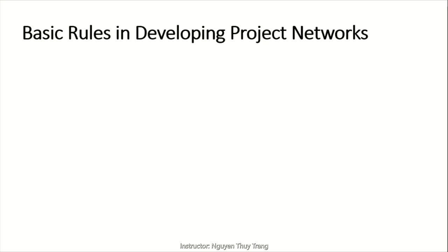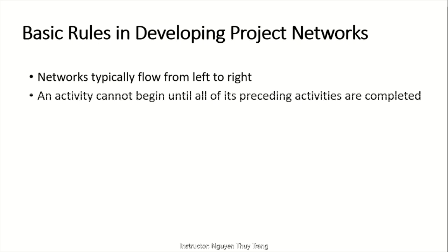Okay, there are some basic rules you need to remember and follow when you construct a project network. Networks typically flow from left to right. An activity cannot begin until all of its preceding activities are completed.